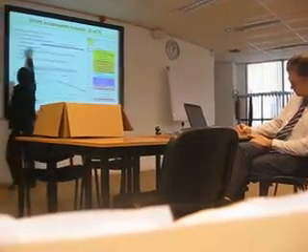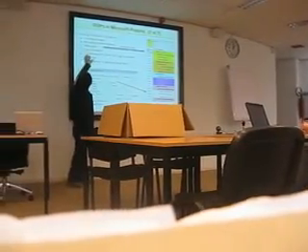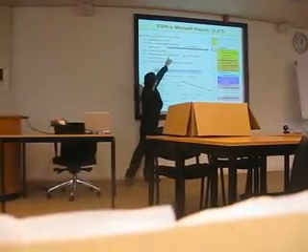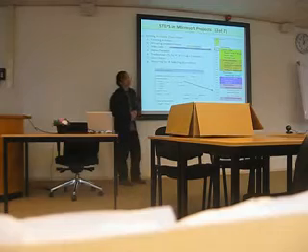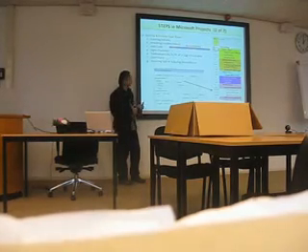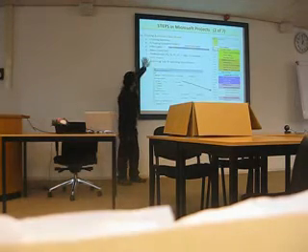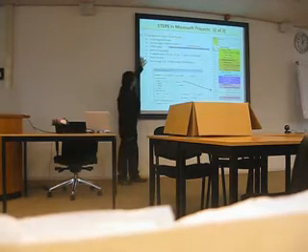These are the durations, and then we need to determine the predecessors, and whether it is finish to start, or finish to finish. Our assumption for this project is finish to start. And also the lag and the constraints. After that, we have the Gantt chart. This one, the recurring entries.